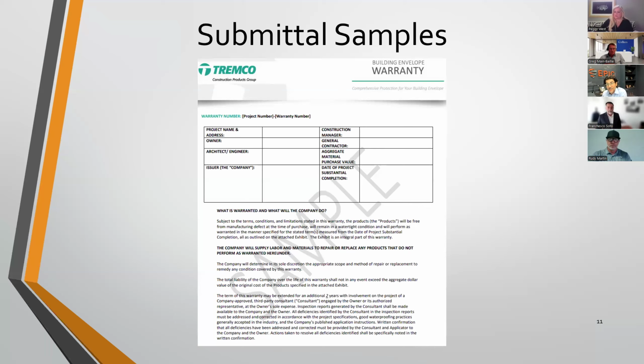So in that same planter scenario that I opened up with, that's covering removal of the planter, removal of the palm, removal of the dirt, removal of everything, and the actual labor and material for the replacement of that waterproofing. So that large lump sum, theoretically in this scenario, would be included.